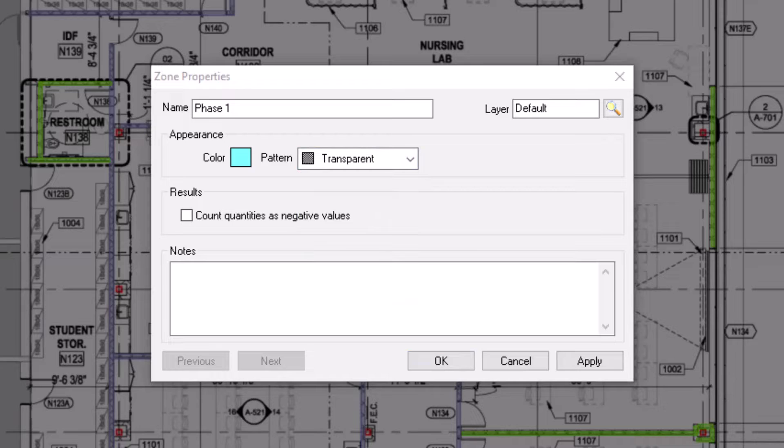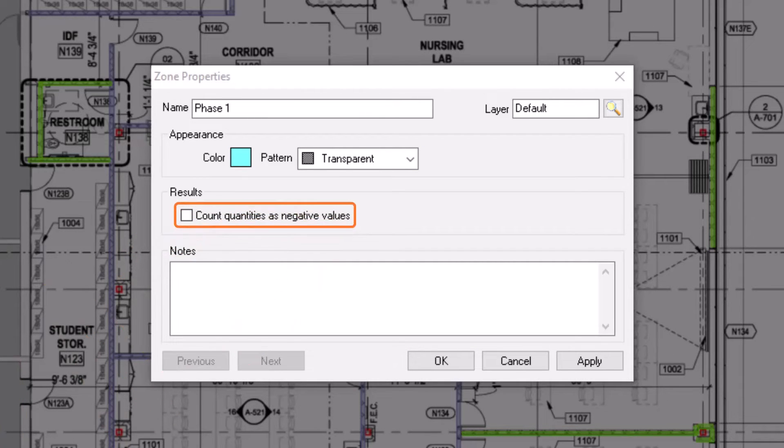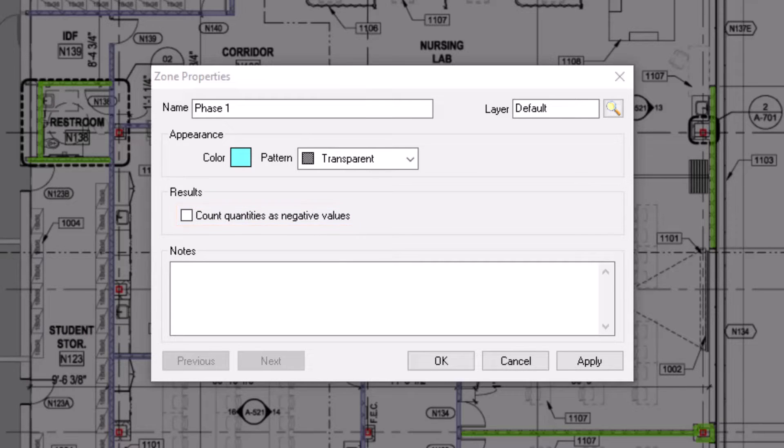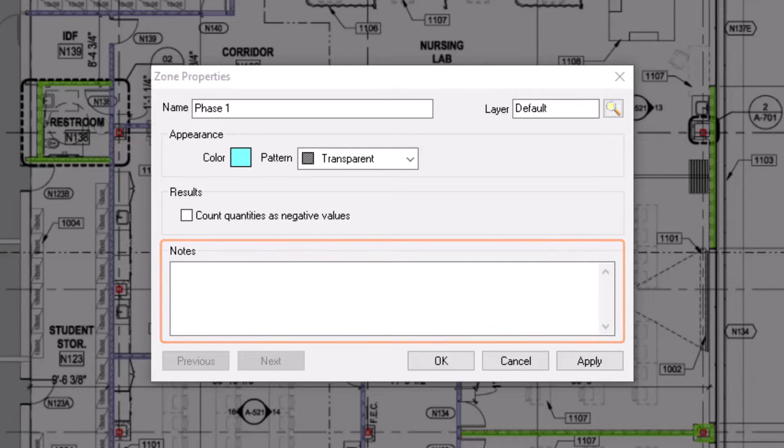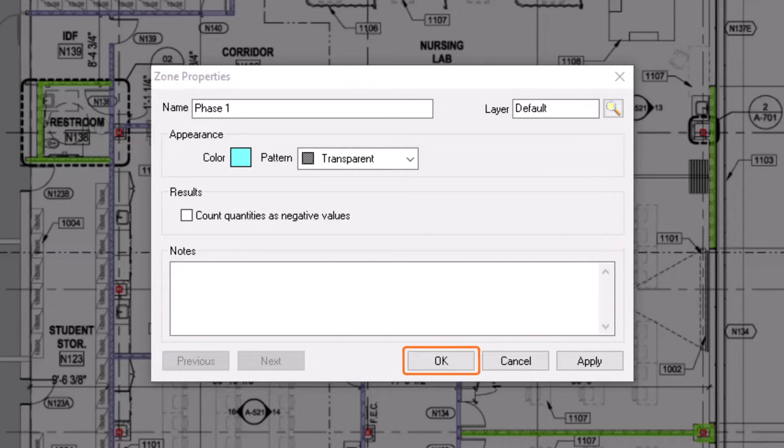You can also count the quantities within a specific zone as negative values. This is particularly useful when working within change orders or alternates, as negative quantities act as a credit. Finally, add any relevant notes you might want to associate with this zone, and then press OK to create the zone.